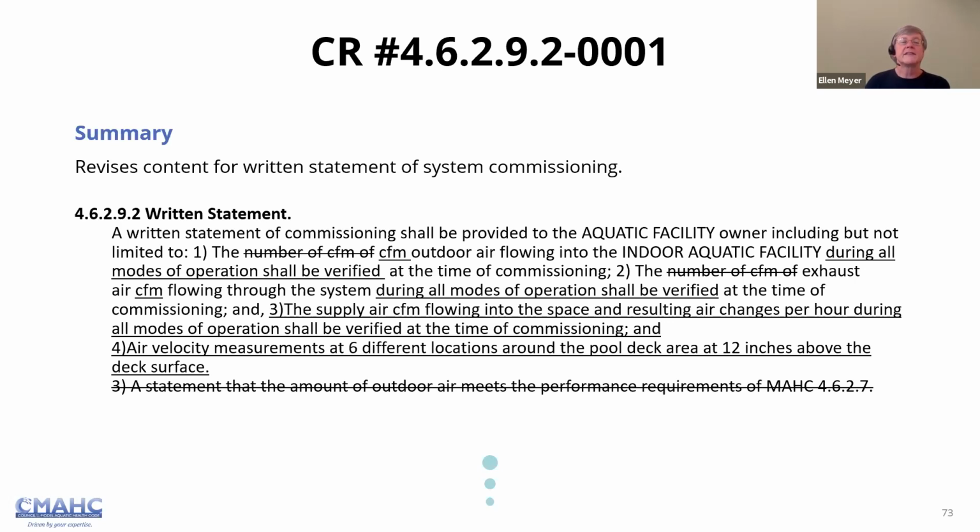One of the provisions in there, kind of towards the middle, says during all modes of operation, you need to verify the operation, make sure that the supply air is flowing into space, and everything is working. So it's just providing more detail into what you really need to check when you do that commissioning to make sure that everything is okay before you give it the seal of approval.